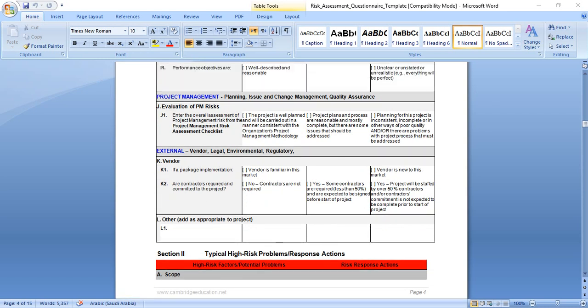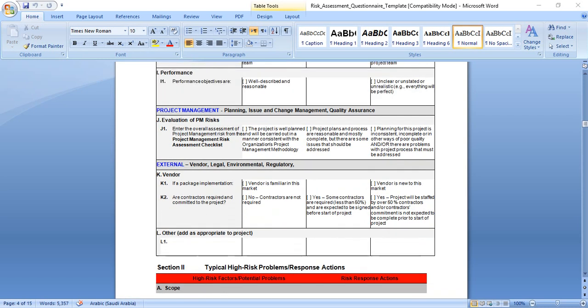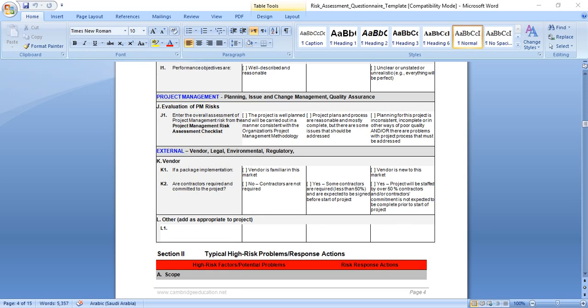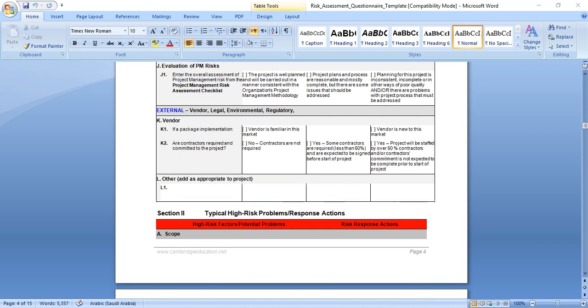Two important points: project management planning issues and change management quality assurance. Evaluation of project management risks, enter overall assignment project management risk from the project management risk assessment checklist, as we saw in the previous picture. The project is well planned and will be carried out in a manner consistent with the organization's project management methodology, this generates low risk. Project plans and processes are reasonable and mostly complete, but there are some issues that should be addressed, medium risk. Planning for this project is inconsistent, incomplete, or in other ways of poor quality, this will generate high risk.